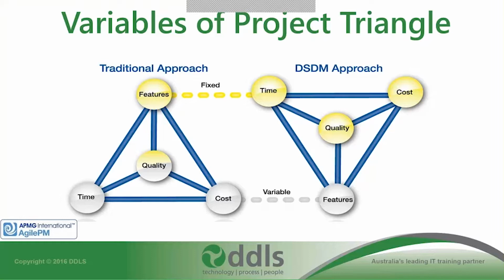And what happens there is you would usually get your business analyst involved in writing up a business requirements spec or a business requirements document, both of which end up being my contract. So me as the stakeholder, the person you're going to build the house for, I end up saying, this is my fixed house, this is what we've come to an agreement on, and this is the contract between you guys as the project and me as the main stakeholder. So you then say to me, Louisa, we're going to go away and build this house to the spec that you've told us, and this is exactly what your scope is. So we've locked that down, and that is classified as fixed.